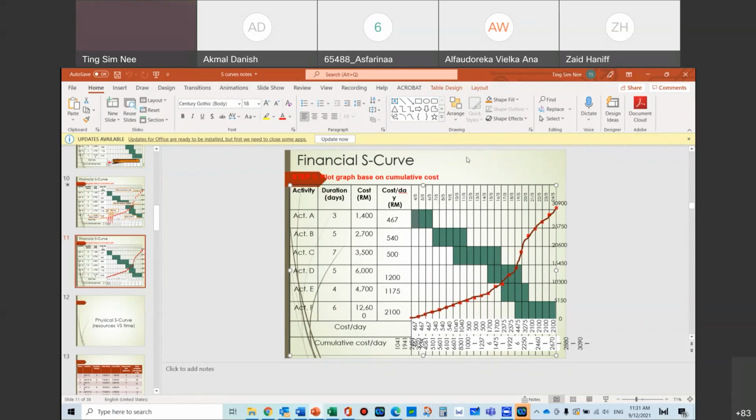So what you do is you draw a line down here. First you have point number 1, PV at month 8. This is your PV. Now you want to find your EV, and to do that you want to find your AC first. Your AC is in month number 8.